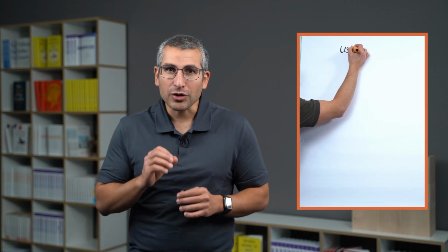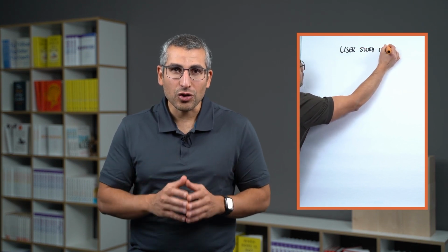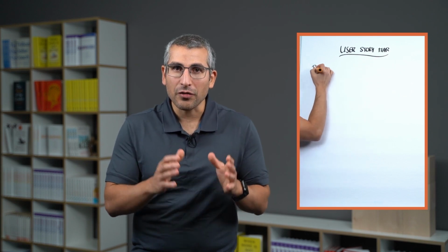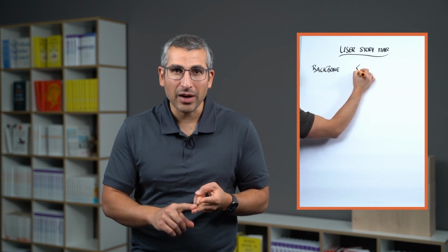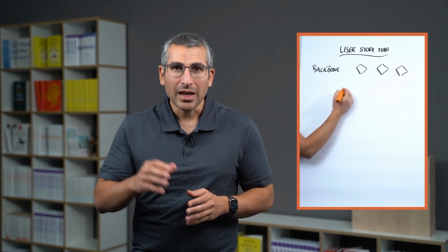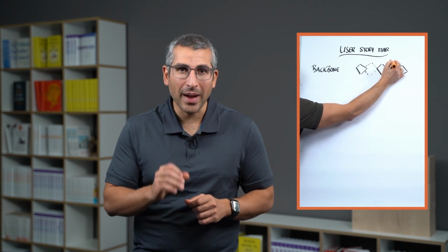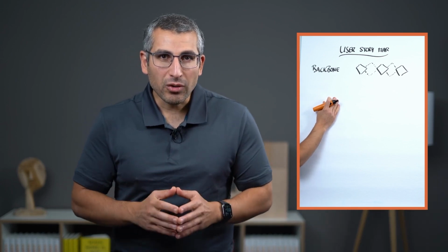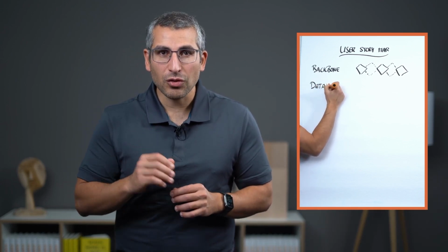Now let's talk about user story mapping as a technique itself. Every user story map starts with a backbone. Taking the previous example of the morning routine, you have going to the bathroom, eating some breakfast, and getting dressed as the key components of your backbone. If you have kids or pets, there might be one or two additional items in your backbone, but not many more. The vast majority of items ends up in the details or options that you add to the backbone.